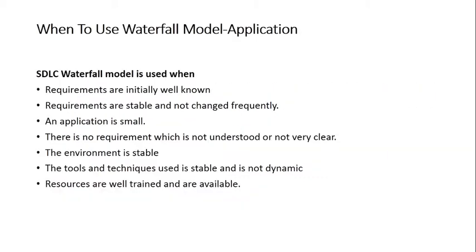Now, when to use this waterfall model? What is the application area? Since we have different models, that means there are criteria for using a particular model. We cannot use all the models in each and every situation or for every type of product you are developing. So the basic requirement for a classical waterfall model is when the requirements are initially well known. If you have all the requirements beforehand, before starting the development, then only we go for the classical waterfall model.